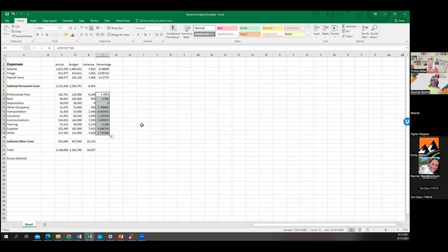And now once we have this, we can actually just look and say, okay, if we're looking for the things that we overspent on, we're looking for these negative percentages, right? So we can see right away, if we're scrolling through here, that training hit, right? That's 6.27%, right? That we were over budget, 6.2%. So if we're looking at percentages, that's a big deal. Now, again, you're going to say, well, it's only a $3,000 difference, but as a category for what we budgeted, we're 6% over.